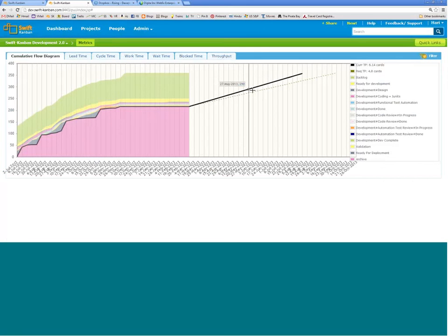And all that we are saying is that depending upon when you want to finish the current inventory, it needs to be a slope line with a higher gradient or a slope line with a lower gradient. So that's what the current throughput or the required throughput is.